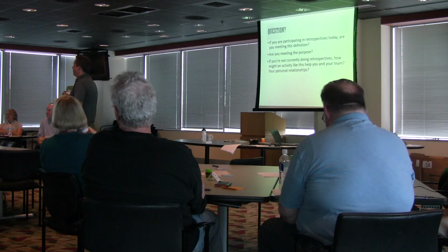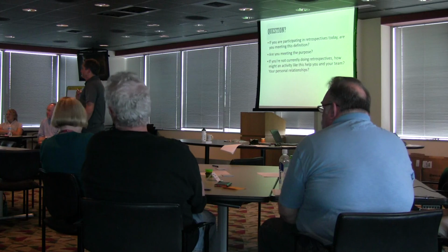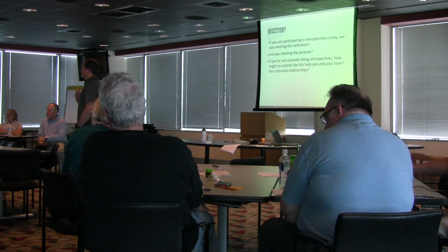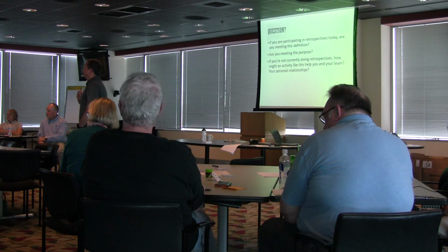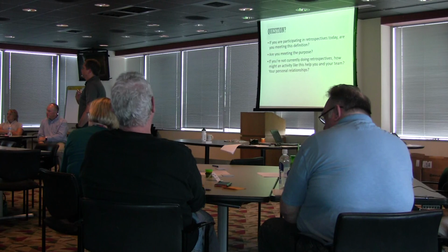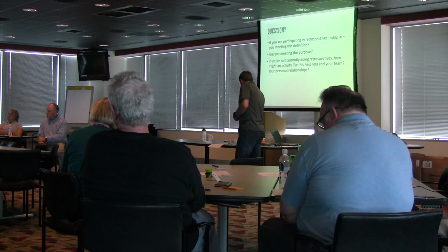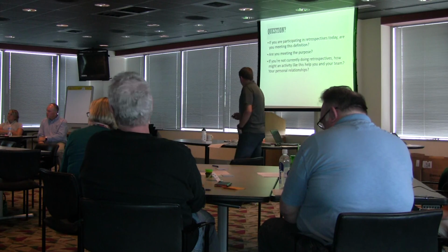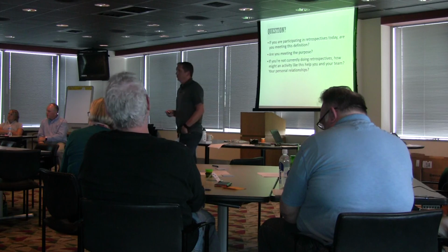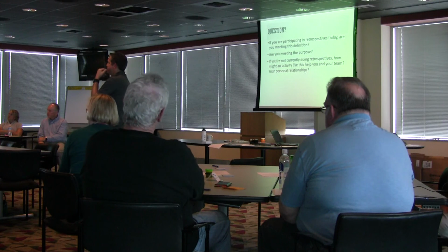Sure, I got an example. We found that we weren't finishing all of our PBIs. It's pretty consistent. So one of the things we talked about was making a checkpoint at a certain point during the sprint, just to see where we were at, and then take the stand up and decide if we need to swarm on one story and get those finished. And then it didn't work the first sprint. So the next sprint we decided we needed to have it earlier, so we had time to actually shift. So we took failures that we were having and made them into an opportunity to develop.